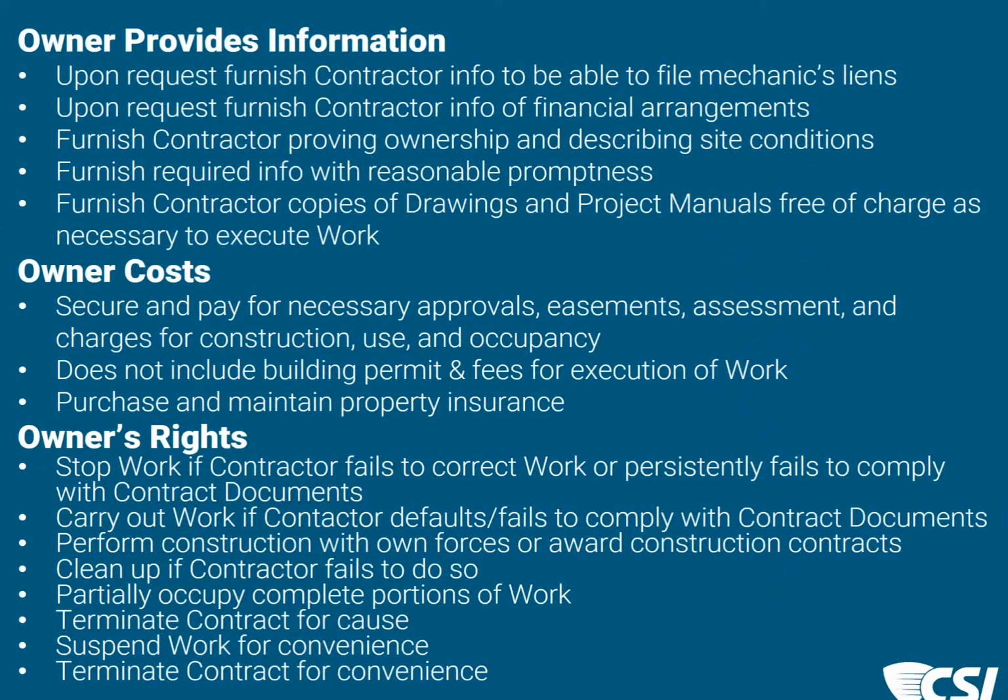They also have the right to clean up the site if the contractor is not doing so. And these things can occur and do occur at the contractor's expense, so that at some point there is an adjustment in the contract price to reimburse the owner for these costs.